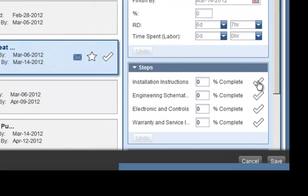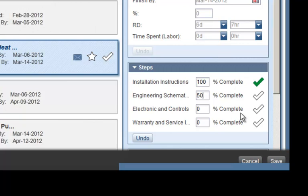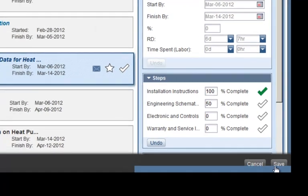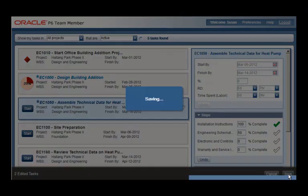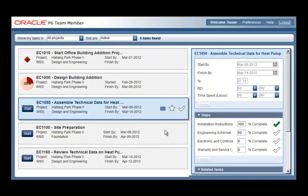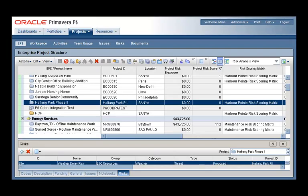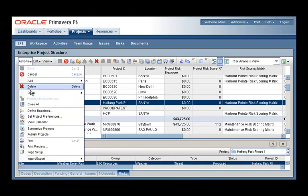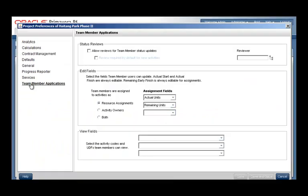Once the team member has entered all the necessary status information, the save button is clicked and the status will be either added to the project or go in the queue for approval if the project manager has configured the project that way.